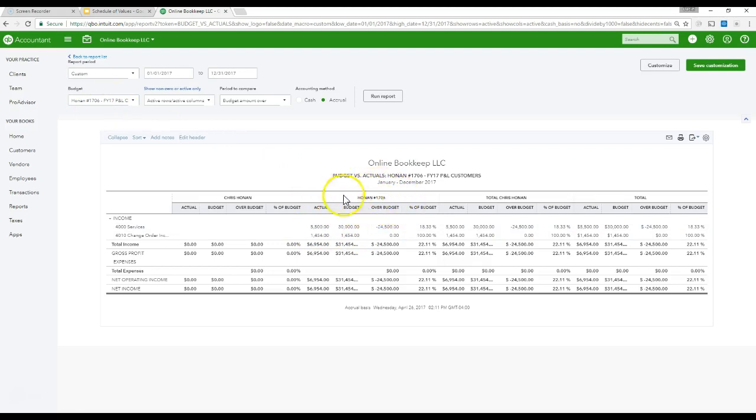Sub customer here is right. You have your actual invoiced versus the budgeted, AKA the base contract. And notice that the base contract is tracking to the services account, and then all the change orders are tracking to the change order income account.